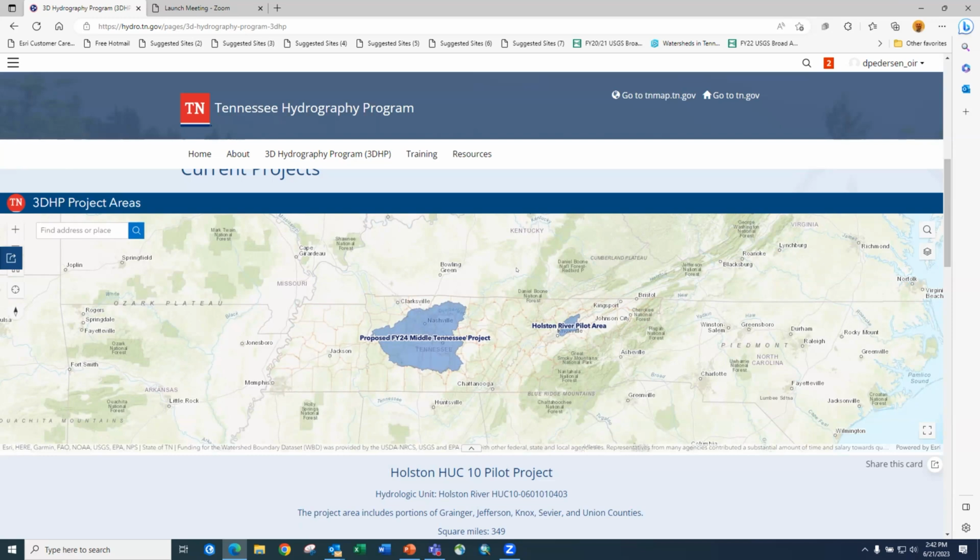Sure. Generally speaking, the cost estimates can come from a couple different places. You can work with the GPSC contractor to get what they think is a cost estimate, or you can request a preliminary IGCE from us, and that's before you submit your application. So that would be the basis of the project cost that you use in your application. You can also use other sources, but it's best to talk to a contractor or ask us for a preliminary IGCE.